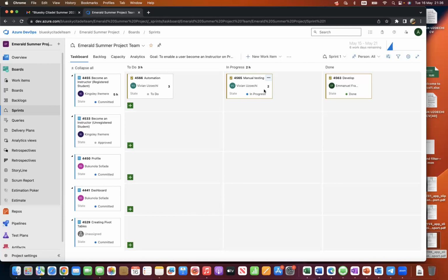That applies to both your sprint board and also your main board. If the developer finished working on a particular story, left it in in-dev, and didn't move it to dev done, the tester won't know the developer has finished and won't be able to pick it up. So your developer puts the story in dev when they're working on it and puts their task in progress.